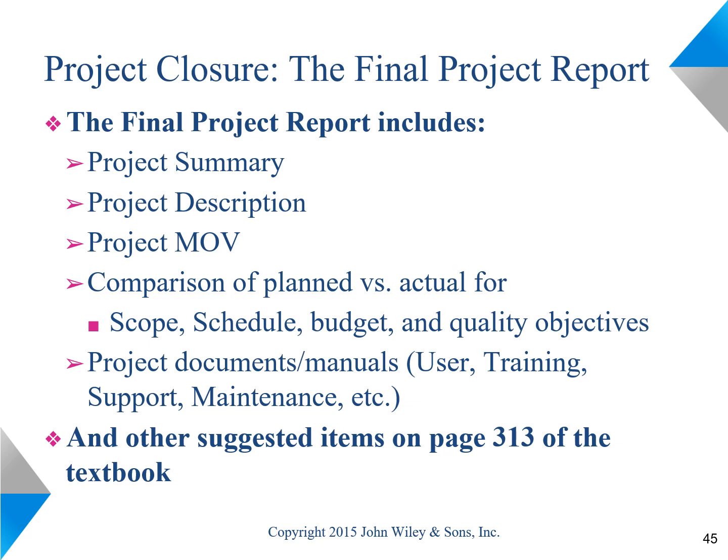Of course, all the documentation that is critical for the users, the training information, the support information, and maintenance information, all need to be put in place and passed on to the appropriate organizations so that they will take care of those, because the project team will be disappearing. There are some other suggested items for the final project report that are in your textbook.